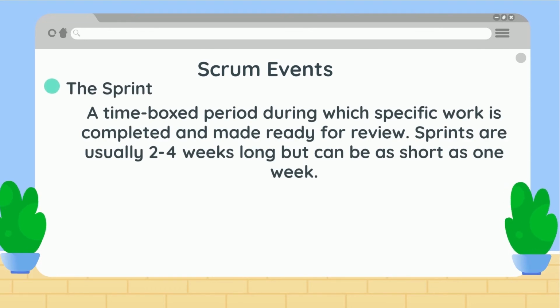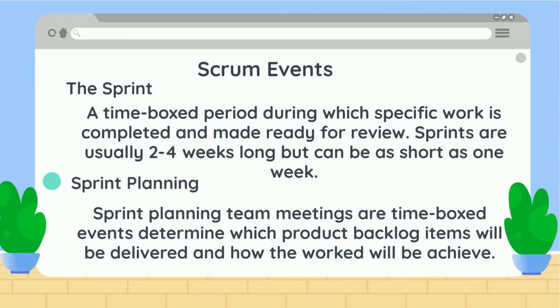The Sprint. A time-boxed period during which specific work is completed and made ready for review. Sprints are usually 2 to 4 weeks long but can be as short as 1 week.